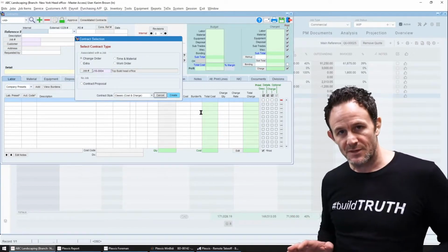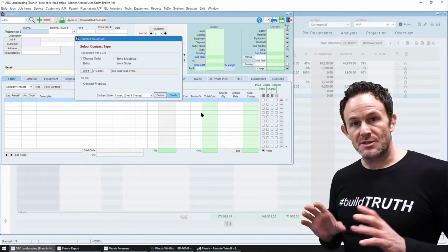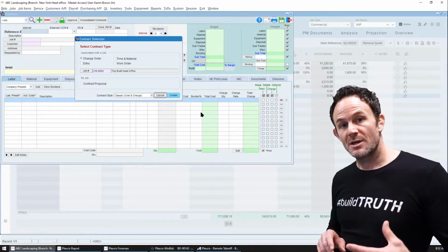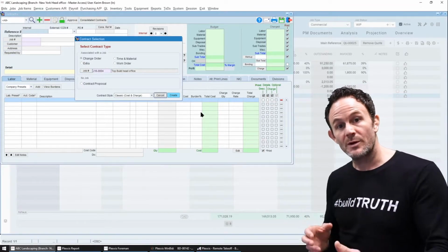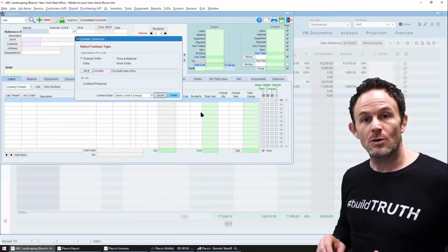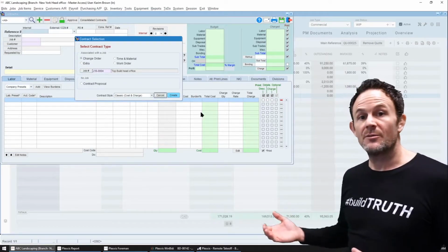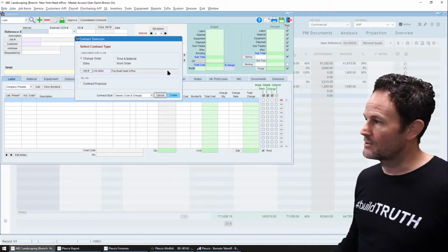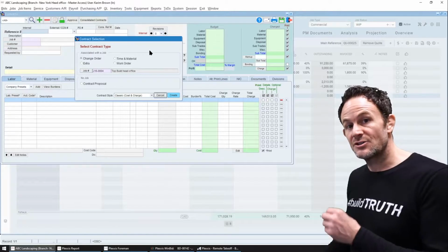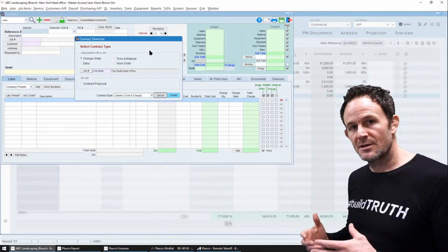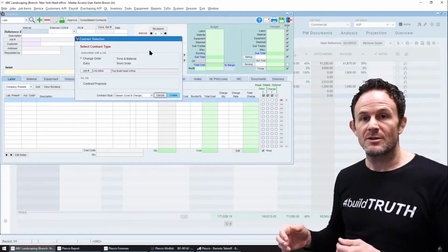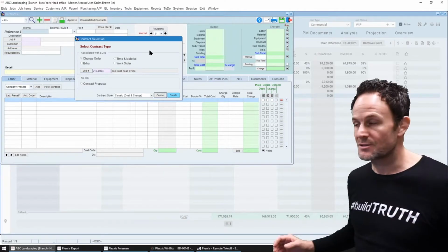Now, in other training videos, we'll show how to complete or price out a contract in this screen. But the important thing for this video is that this is the single repository for any change that happens on the job, regardless of where the change is coming from. If it's coming from your estimating system or WinBid, it'll populate this contract screen. If it's coming from a T&M ticket or extra work order ticket that's done in the field app, it'll come into here as well. And dependent on what your company's presets are for changes on each job, the tickets, when they come in, they'll be automatically priced and then packaged up with all the supplementary documentation to help you get paid so you can send it to your customer.